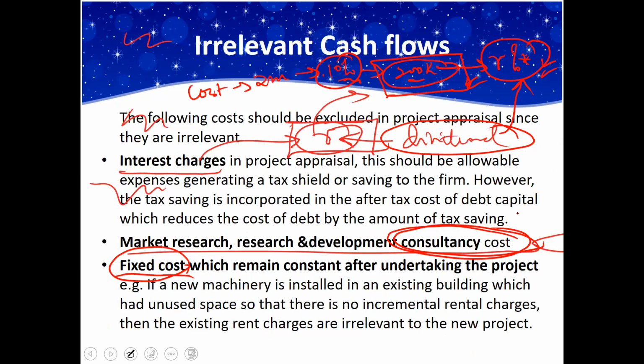Okay, interest costs and the dividends, these are returns you're paying to the providers of capital. The interest costs you're paying to the bank, for example, the dividend you're paying to the equity shareholders. So you're trying to say that these interest costs, as well as the dividend, are cash flows you pay because you did obtain money from this provider of capital. Therefore, they are part and parcel of the cash flows which you ought to consider. However, they are accounted for by the discounting rate, by the rate we use to get the present values.